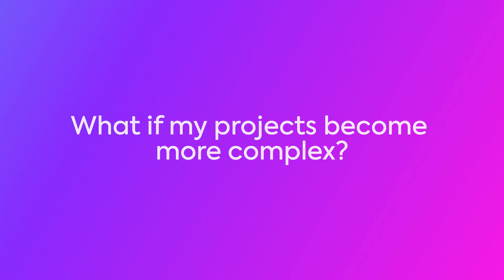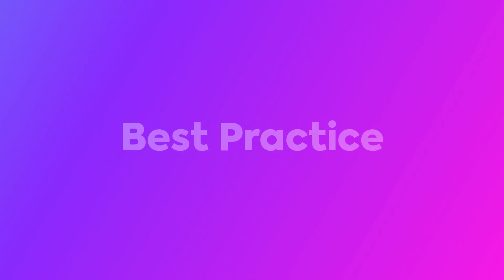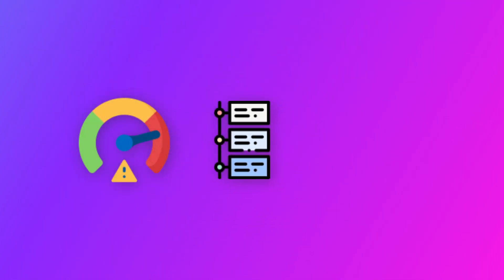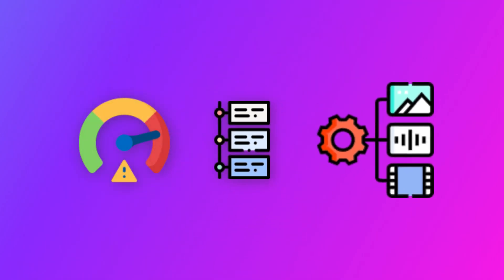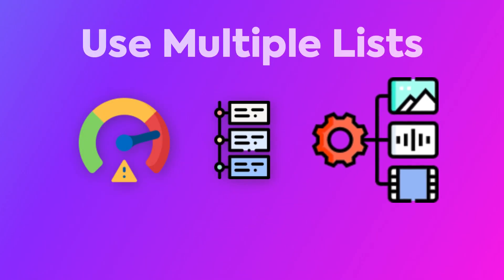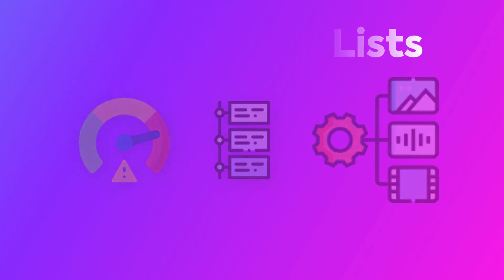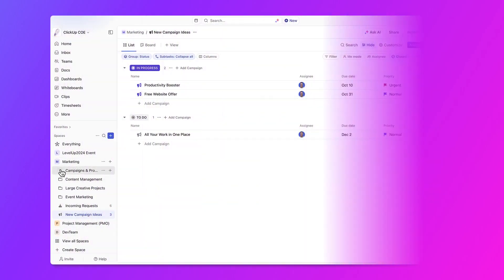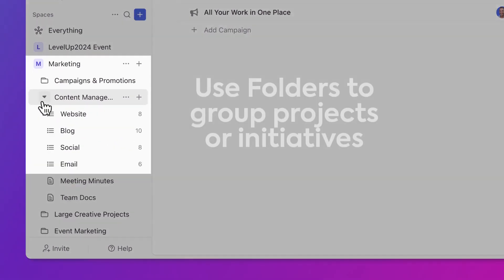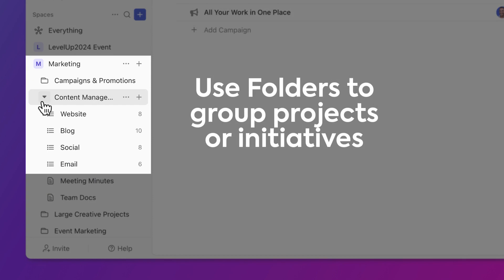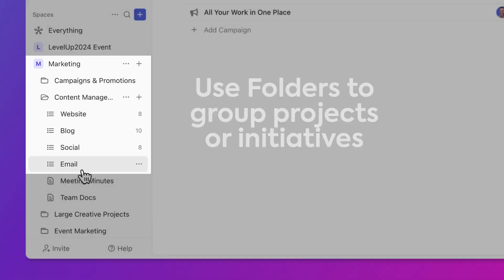As a best practice, if your projects require you to track multiple aspects of a project — like risks, phases, or assets — you may use multiple lists. In which case, you may want to use folders to group these more complex projects or initiatives together.